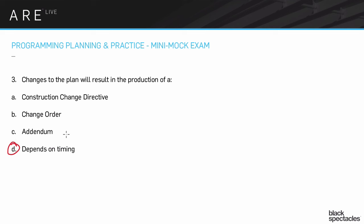Hopefully the word addendum is not a surprise to you because it's likely to show up. So is change order. So addendum is going to be one of those things where you've done a bid set, you've sent the bid information out to the various bidders. They're going to look at that information, and as they start pulling the numbers together, they're bound to have some questions. So they're going to call you up and ask you a bunch of those questions.